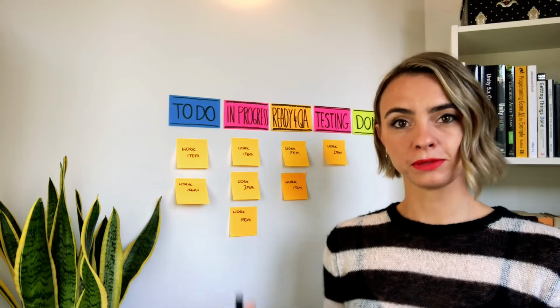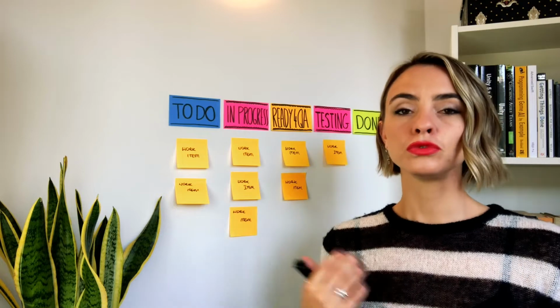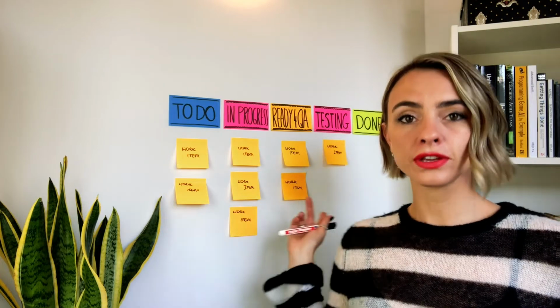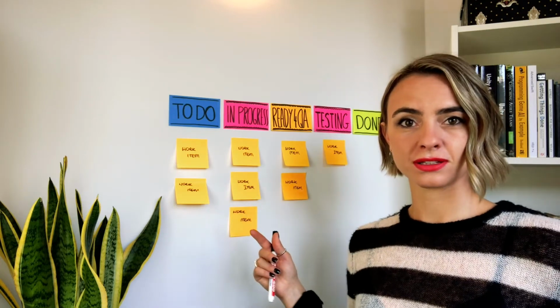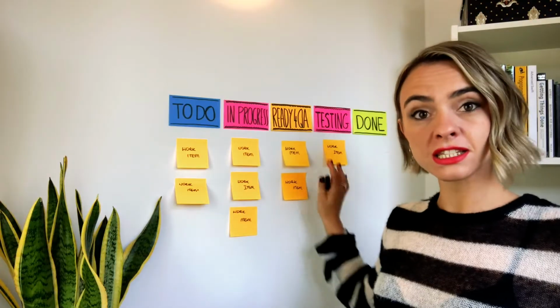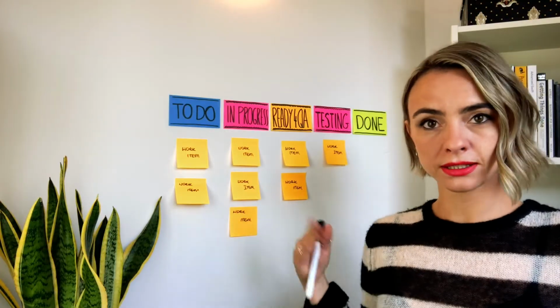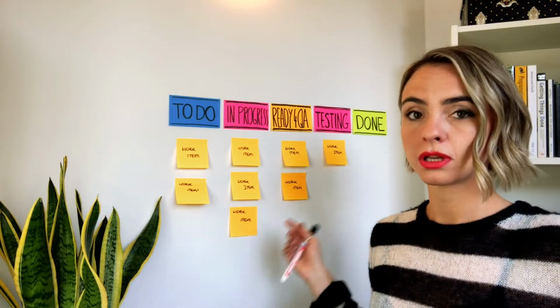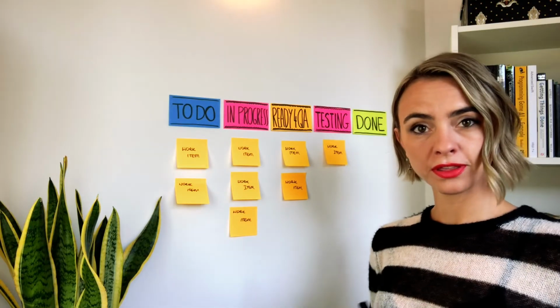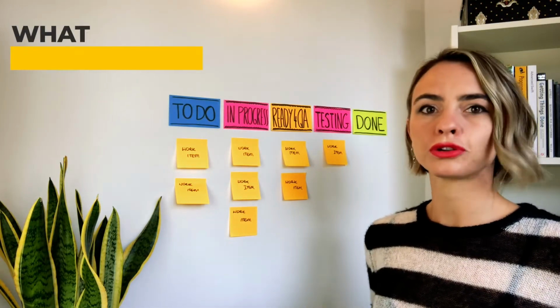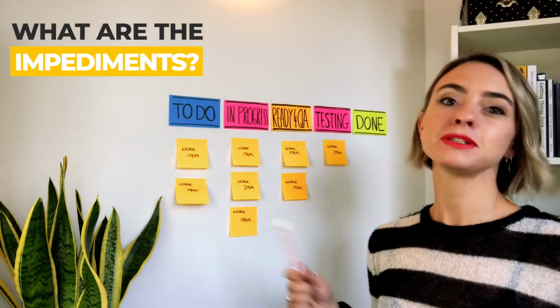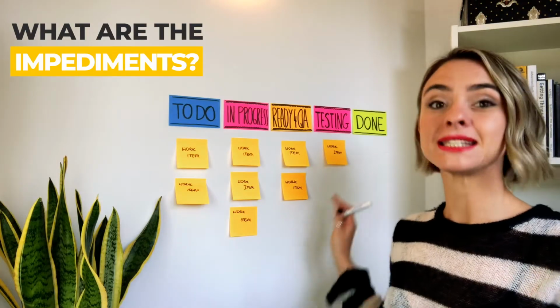Once the team has a plan to deliver something today, move on and address all the issues that you have in progress. Check what's going on in each and every one of them. In case there are some blocked issues, try to unblock them. An important thing about impediments or blockers: any issue that has been started and got blocked is an issue in progress.